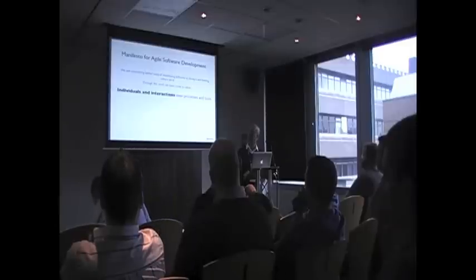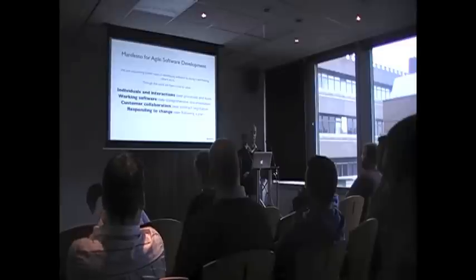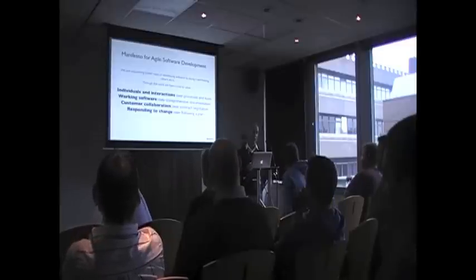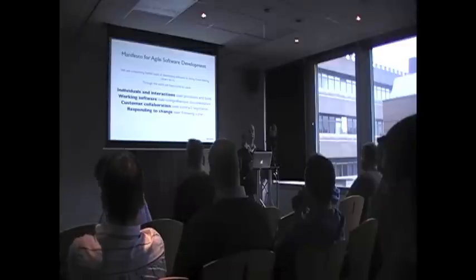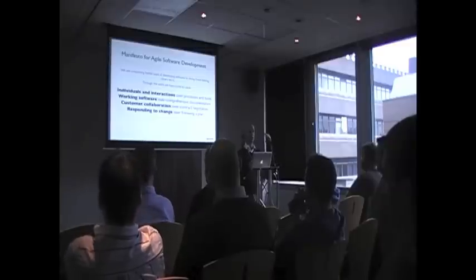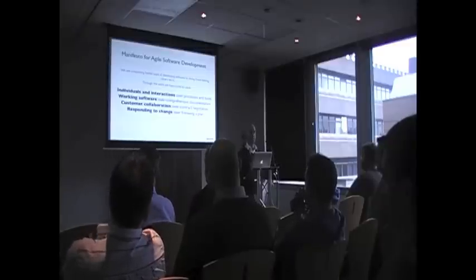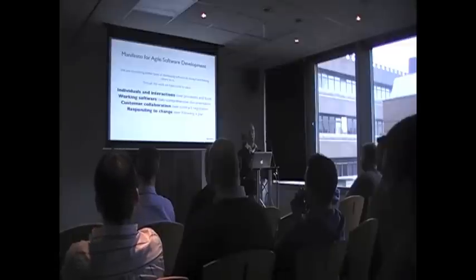The main manifesto for Agile: individuals and interactions over processes and tools, working software over comprehensive documentation. So the point of Agile is you don't do that massive document at the beginning. You create a to-do list fundamentally. It's a list of user stories that are prioritised, the most important ones at the top, least important down the bottom. So working software, basically just start developing.